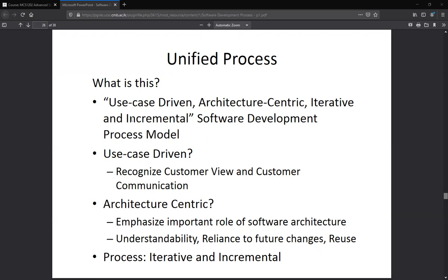It's something like this: based on the requirement, you identify that the client needs a one-story house. But suppose you put in a foundation for a two-story house and you build a one-story house, no harm. But somewhere later, if the client says, no, I also need something more, and he wants to go for two stories, then the structural engineer will be in a big problem if the foundation is not good enough for that.